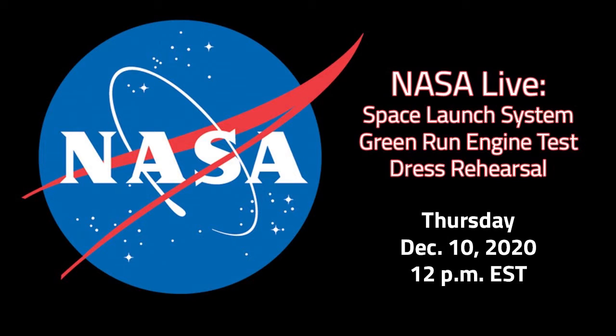And we've also looked at how far in the count we have to go down before we could go into hot fire, and if we have an earlier cutoff than 33 seconds, that is not necessarily an issue. It really depends on why we had to cut off early. So that will be part of the discussions we would have with all the technical authorities and with our program office to ensure we're ready to go. But as long as we can get the majority of our verification and validation data out of the wet dress rehearsal, we'll be good to go into the hot fire.